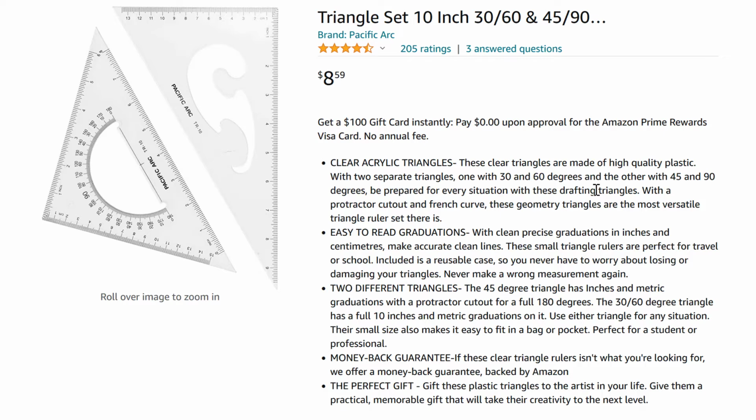Another aspect of estimating is value engineering the drawings. For example, if you can combine the circuits from 2 conduits on the drawings into one conduit, you just saved yourself from having to run one entire conduit. That not only saves on material costs, but labor costs as well.